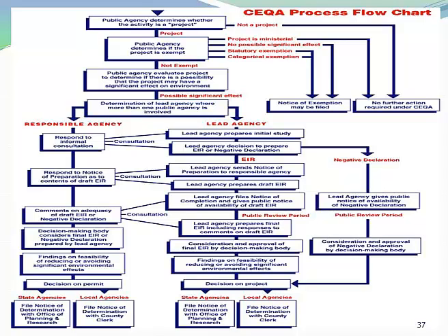Okay. One final question, or one more question has come in. If a city is proposing a redevelopment project at a site and the cleanup is just one piece of this, is DTSC's responsible agency checklist process focused on only the cleanup project and the cleanup project's potential impacts? Yes. The way that CEQA operates is the agencies such as ours that are responsible agencies, we have to limit our comments to our area of statutory responsibility, and that would also include suggestions for mitigations if we see impacts that we feel would relate to our project.